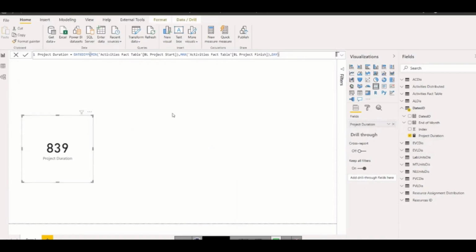You can simply check your baseline duration against the contract duration. Maybe you need to add +1 or -1, because sometimes our calculation says that if you have two dates available and you want to calculate a duration, you need to do +1 at the end. If you have one date, which can be the project start date, and you have the duration, and you want to calculate another date, which is the project finish date, you need to subtract 1. So sometimes the P6 calculation is different, the Excel calculation is different, and Power BI is different. So you need to check what is the